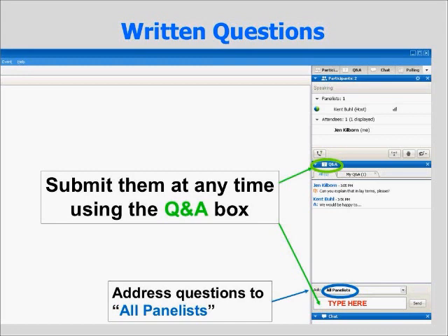There's all kinds of things like change of density and things like this that you have to think about in terms of which level of review you do. And they're found in 58.35, and exemptions are found in 58.34. But the bottom line is, you don't make this up. Anything you do, you're basing it on what's in the regulations.